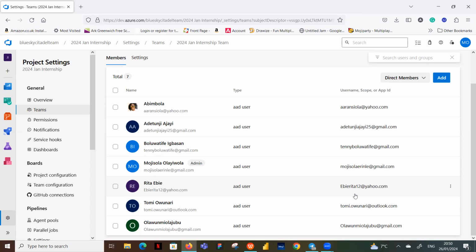Now, if we use the generic Scrum that is there, whatever you customize or configure on your board will reflect on every board that is using the Scrum process. And you don't want that. So that's why you create an inherited process from Scrum, so that whatever we configure stays on our own board. It doesn't transfer to other people's boards. And what other people are doing on their own boards, depending on how they've customized it based on the project they are working on, does not come onto your own board.